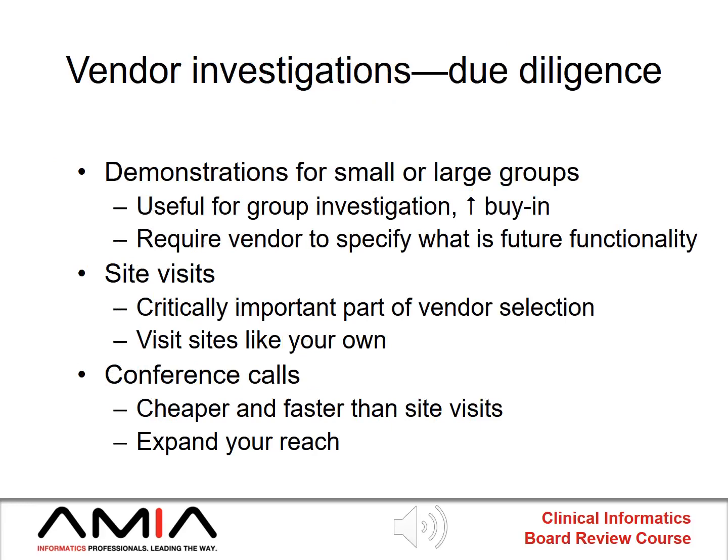It's very important that you exercise what is referred to as due diligence in selecting systems. Due diligence is what a reasonable person would do to investigate a business opportunity or a potential licensing of a system. The steps that are often used in exercising due diligence are first demonstrations, which serve several purposes. The first is that they are educational. Secondly, they help bring the group together to involve everyone so that they genuinely feel that they have a stake in this initiative and they understand the trade-offs in the different options that are in the marketplace.